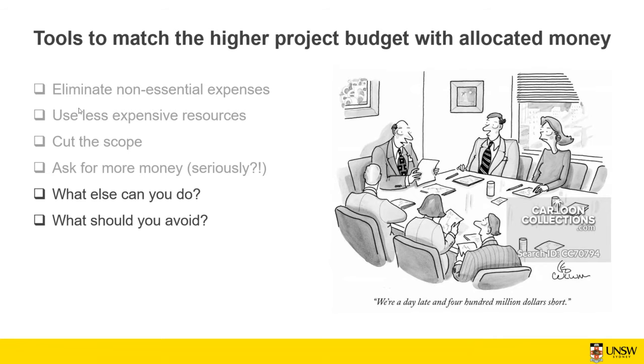Yep, compromise on quality. Definitely, that is very important. You need to do all the due diligence if you want to get some work done, for example, with the contractors or any material that you want to use for the project. It doesn't mean that if you can get it cheaper, it's going to be good. Sometimes you need to redo it, and it incurs a lot of costs, and also your reputation is on the line. So you need to avoid it.